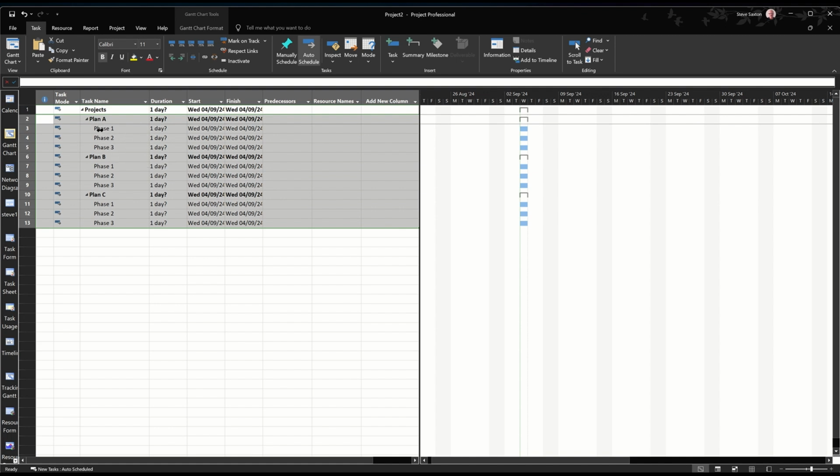Now I've got this set to automatic schedule down the bottom there. You can see I don't want this to be typed over. You can type it, but I want these summary tasks to summarize the tasks underneath and give me a score on the door. I don't really want people to be able to type on that. You can type on that, which is not great, because you then change it to a manual task.